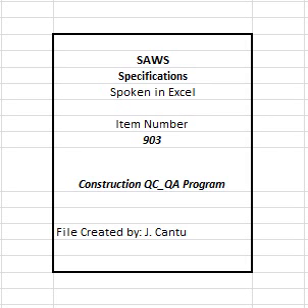9. Testing procedures described in the contract documents are another form of quality control to be performed at the sole expense and responsibility of the contractor, ensuring delivery of an end product which meets the requirements in the contract. Testing requirements and procedures shall include, but not be limited to, the following: A. An outline of proposed testing procedures developed and submitted prior to construction. B. Provide a listing of all required tests as specified in the contract, in addition to providing a listing of all non-specified testing procedures pending approvals.